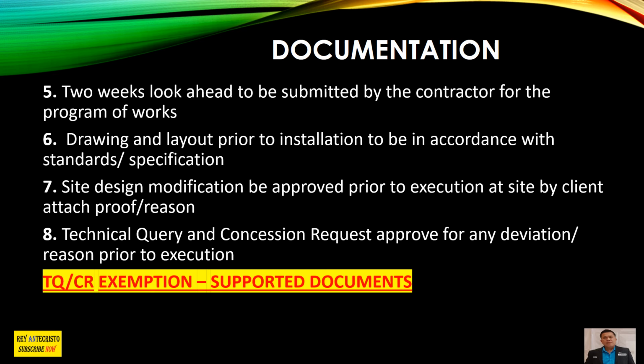So TQ, we call that technical query, and CR is a concession request, because we've submitted to the engineering. If you are from engineering, you can understand what this concession request means, and also from the construction engineer, before the execution. That's why I'm telling you, technical query is always there during the construction stage. There is also sometimes an MOC, like that.